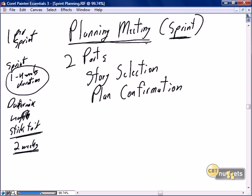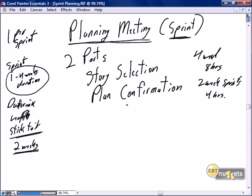A sprint planning meeting for a four-week sprint should take no more than eight hours. If you're doing two-week sprints, your sprint planning meeting should take no more than four hours proportionally. You would certainly never spend a full eight hours planning for a two-week sprint, and even less for a one-week sprint. We set aside four hours for our sprint planning meeting and equally distribute it into two parts.